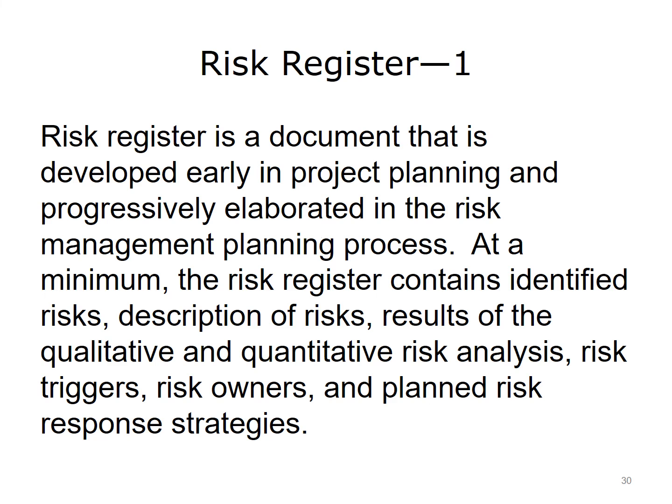A risk register is developed early in the project planning process and elaborated on during the risk management planning process. The risk register contains identified risks, description of risks, results of the qualitative and quantitative risk analysis, risk triggers, risk owners, and planned risk response strategies.